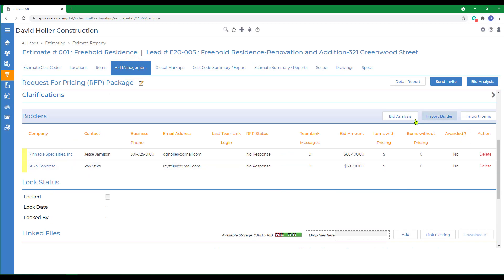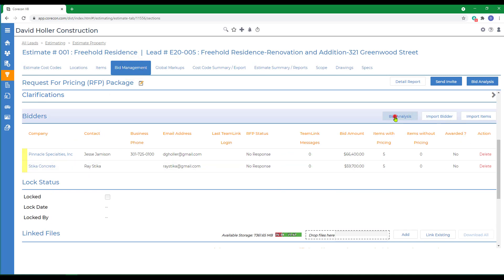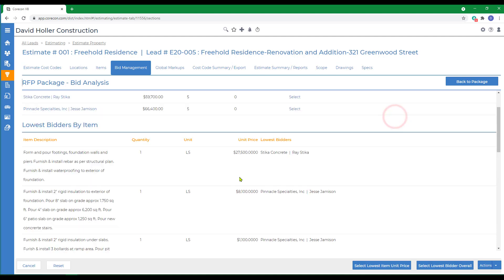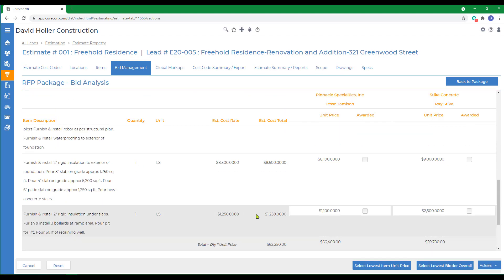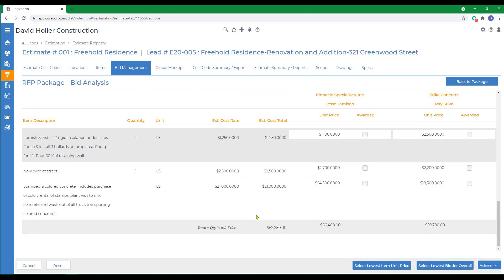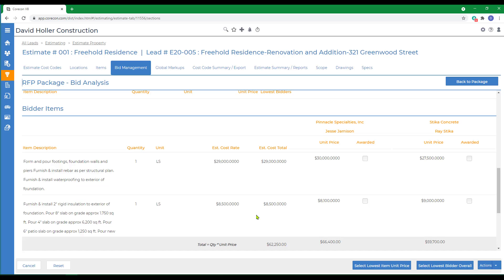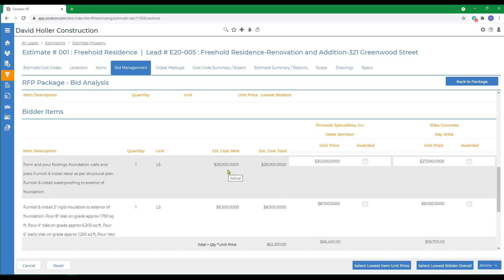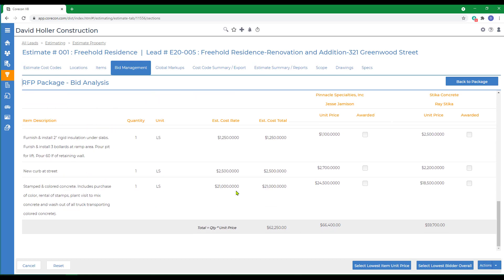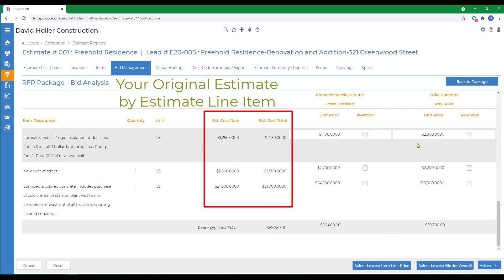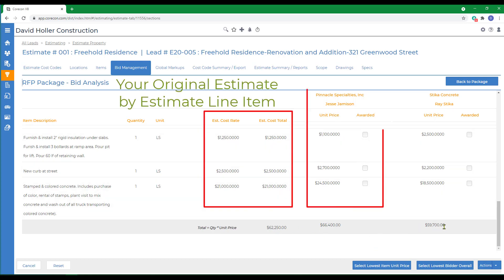The next step is to run the bid analysis. There's some summaries of how everything came in. Then when we get to the last section, you're going to see, in this case, three different columns. First is the estimated cost, which is the cost that before RFPs were sent out. Then each of the bidders will also show up as well and their totals. Notice these are unit costs.